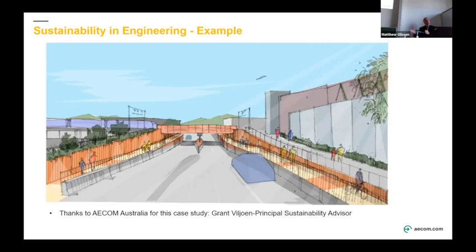What would that extra borehole have cost you on the project? Well, 2 boreholes. It often comes down to that 20,000 euros difference in GI, and all these other benefits come out of it. It's the age-old problem we've had as ground engineers: trying to convince clients to spend money up front with the GI. That's where the expression "you always pay for the GI" comes from, because if you don't pay for it at the front end of the job, you'll pay for it later on from things that go wrong or unknowns.